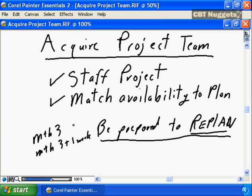As a result of staffing challenges, as a result of matching availability of resources within your organization to your ideal project plan, there have been some staffing shortfalls. You've developed a new plan. Don't accept it. Develop a new plan and notify senior management, notify the sponsor that says the project is now going to be delayed. As a result of staffing shortfalls, the project has to be delayed by 1 week.